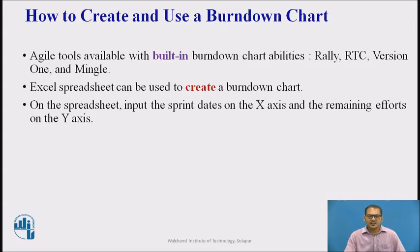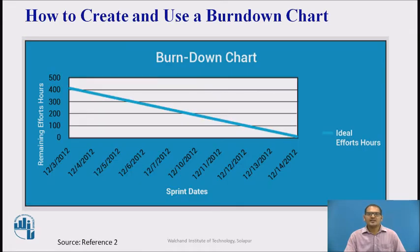On the spreadsheet, input the sprint dates on the X-axis and the remaining efforts on the Y-axis. Let us see an example of an ideal Burndown Chart shown. In this example, the sprint is at 2 weeks. The team consists of 7 members working 6 hours per day for a total of 420 hours.